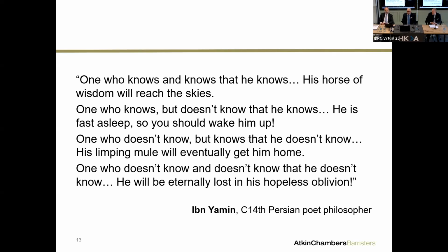So I think the base position, certainly in the last few I've seen, has been EPC, quite a lot of FIDIC Silver, particularly internationally, or something like it. But with these bolt-ons and these other issues which are causing problems, and some of the problems I think are a result of people not thinking about what they're doing when they say, okay, I'll take the Silver, because the Silver is by reputation one of those contracts where you think, actually I can just pass it all over. When you start adding things on, of course, those interfaces are the ones I think are quite tricky.